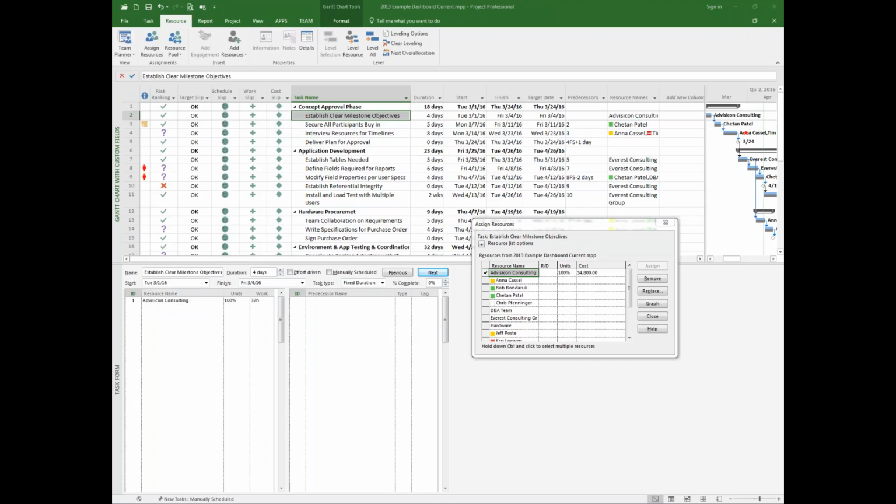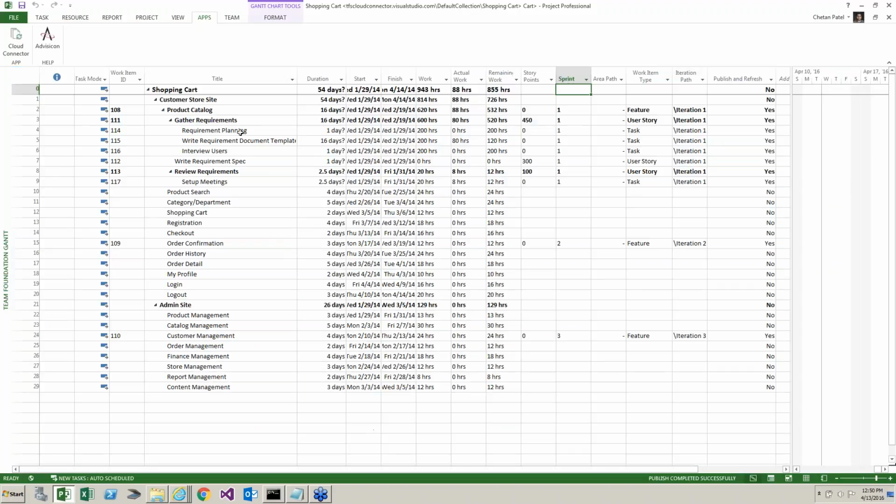So what I would suggest from that perspective is, when we have a project schedule, and these are a list of features, you don't want to assign features to one particular developer. You want to give it to your lead, or maybe a department, however your organization is structured, and assign that to that particular resource and let them manage all the activities around that feature.